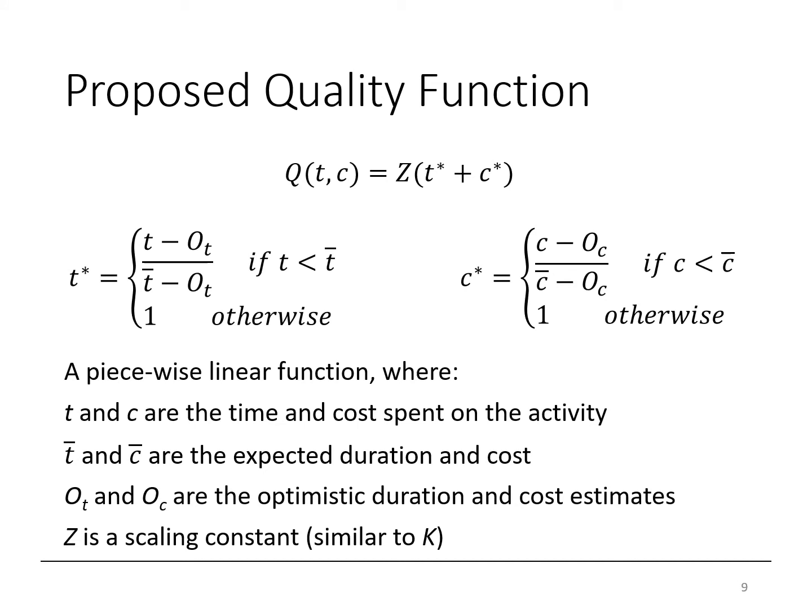Based on these insights, we developed a new quality function. Like the other function, it's a function of time and cost. However, our function is based on the time and cost spent on the activity, the expected duration and cost for that activity, the optimistic duration and cost estimates for the activity, and a scaling constant similar to the variable K in the other quality function. We can get the expected and optimistic durations and cost estimates from a simple three-point estimate, such as the one done in PERT analysis.